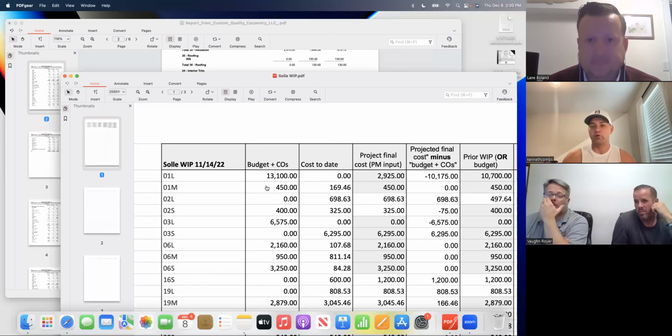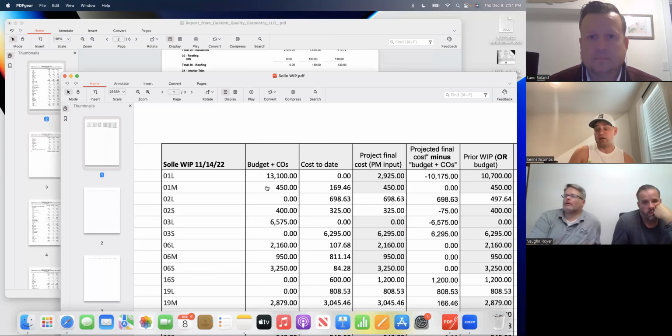And these are all just things. Each thing is not major, but they all add up. If you do it across 50 line items on every job, all these things add up, and that's where you get from our slippage was 9%, and now it's less than 0.5%. It's like 0.3%, because it actually affects them. And I think this WIP will actually be in grippage, which is fantastic. We have $6 million in active jobs right now, so to have grippage on that much work across that many jobs is fantastic.